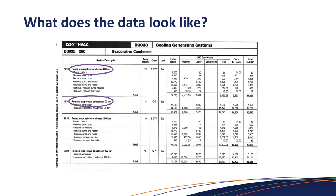Taking an example of a condenser — getting into the HVAC world — if you're trying to decide whether to outsource or do something in-house, the data can break it down from a costing standpoint. They even give you more detail: if you implement this condenser, this is roughly how long it should last, and how often you should or could repair it. So in addition to cost data, it also has lifespan data for all their assets.